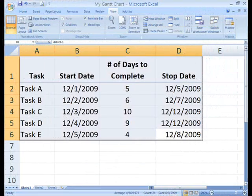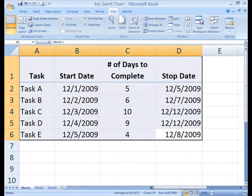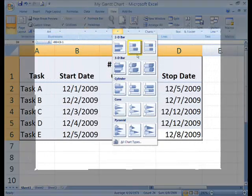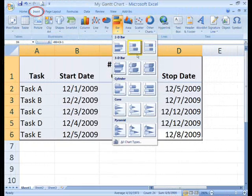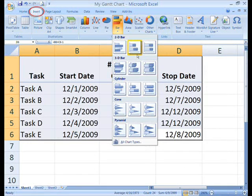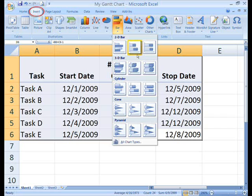Select the data in cells A1 through D6. On the ribbon, click the insert tab. Then in the charts group, click bar chart, which opens the list of styles. At the top of the list under 2D bar, click on the stacked bar chart.